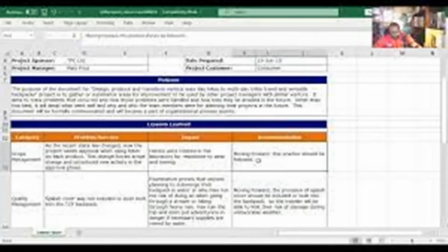The lessons learned register may record challenges, problems, realized risks and opportunities, or other content as appropriate. The lessons learned register is created as an output of this process early in the project. Thereafter it is used as an input and updated as an output in many processes throughout the project.